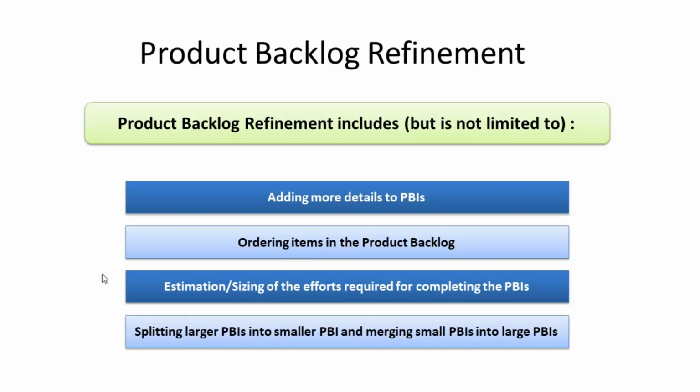The product backlog refinement includes breaking down of the product backlog items into smaller and precise product backlog items which are ready for the development team to work on. The existing product backlog items can also be deleted if they are making no sense for the future. It helps developers understand and evaluate the readiness of the upcoming work, and the PO gets the clarifications for the open questions.